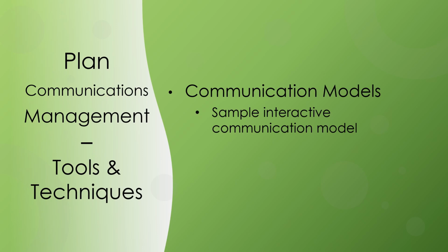The additional steps in an interactive communication model are: acknowledge. Upon receipt of a message, the receiver may signal or acknowledge receipt of the message, but this does not necessarily mean agreement with or comprehension of the message, merely that it has been received.